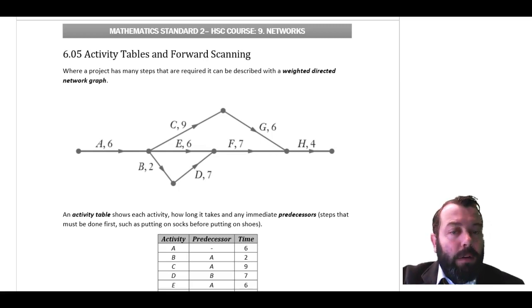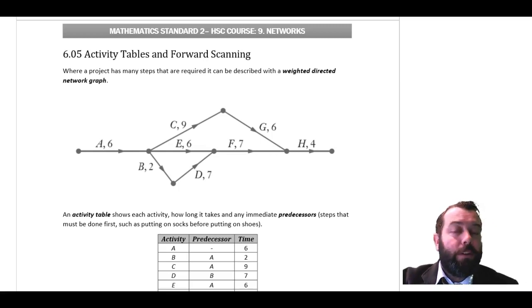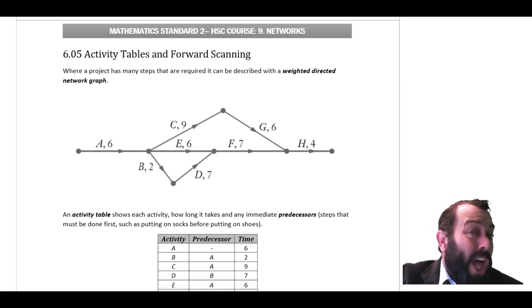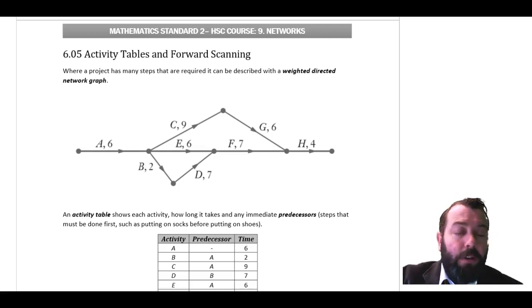We start now, at least in this exercise, labeling our edges and not the vertices, which has been the convention until now. So this time, the edge is the most critical part, right? And the vertex is just sort of a checkpoint, an indication of where that activity starts and finishes. Now, we might be using these to model all of the different things that happen when you build a house, perhaps, or when you are cooking a meal. There are different elements that need to come together.